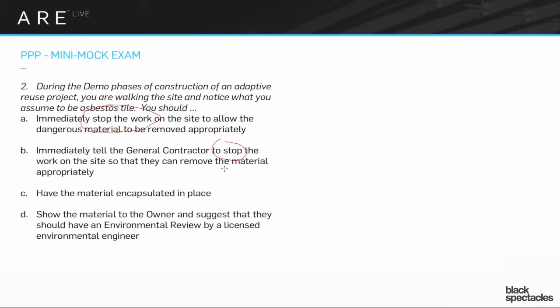With A and B, the architect is walking on site and just telling people to stop work. You have no idea about what's going on with the schedule — it's not your role. There might be penalties if the contractor comes in late, or timing issues with other workloads. You'd also be taking on liability around schedule, which can be significant financially. So A and B are definitely out — you're not telling anybody to stop the work.